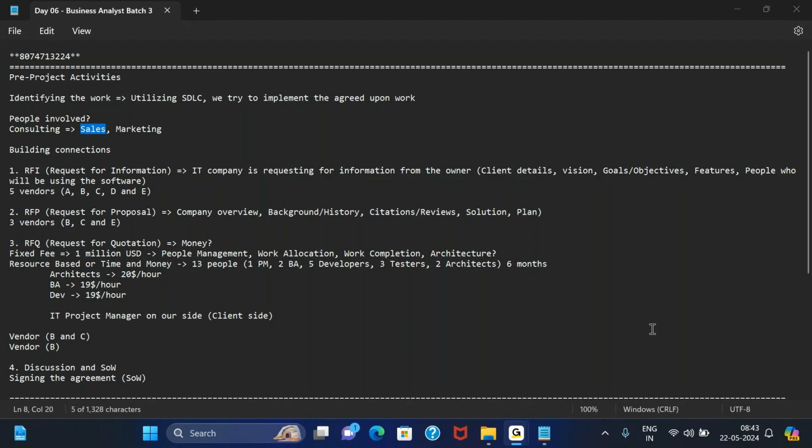Now if someone says you can scan or you can type the product ID, and once you type the product ID and hit enter, it should automatically populate the product details, that feature may take another 1 week. So originally we thought we would do the entire development in 1 week and testing in 1 week. Now maybe development itself will take 2 weeks and testing will take 2 weeks. So the estimates change because there is a change in the scope of the work assigned to me. For that you don't sign the SOW again.